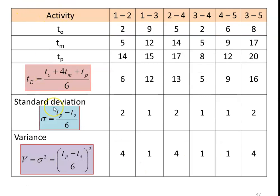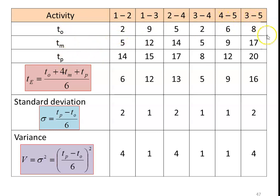First we calculate the various parameters: expected time, standard deviation, and variance of the activities. The activities are 1 to 2, 1 to 3, 2 to 4, 3 to 4, 4 to 5, and 3 to 5. The TO, TM, TP values are taken from the problem. The expected time TE is equal to (TO + 4TM + TP) divided by 6.